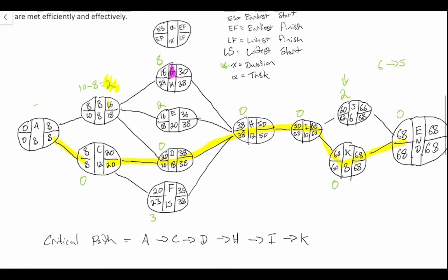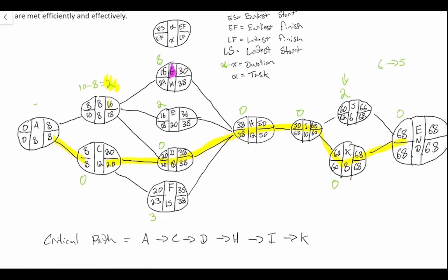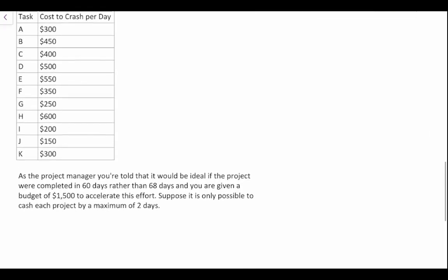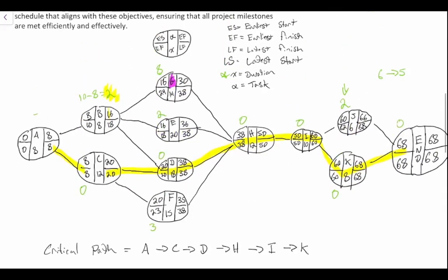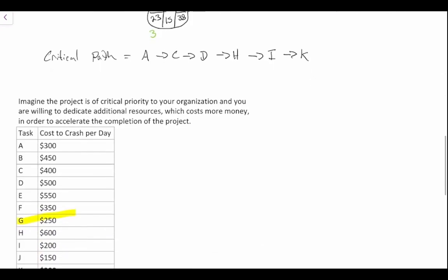Simply reducing the time to complete project J won't help us finish the overall project faster because of that existing slack. We can do the same analysis for other nodes — like point G, which has a slack of 8 (24 minus 16, latest start minus earliest start). G is also relatively inexpensive to crash but it's not on the critical path, so it won't speed up the project either.